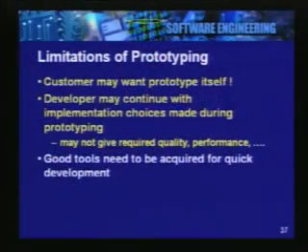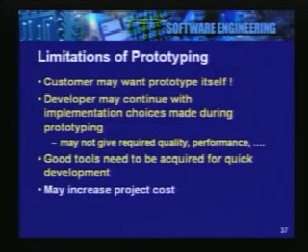Good tools need to be acquired in order to do a prototype, because we want to complete the prototype quickly in the minimum cost. So, this is an investment we may have to make, which adds to the cost of the project. So, one of the problem with prototyping could be that it may lead to a higher project cost, and there are other problems that we have just mentioned.